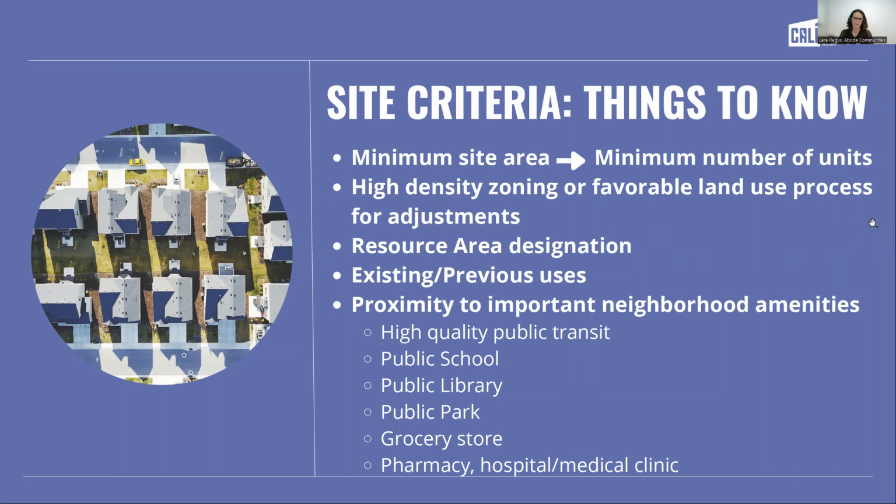Is it a triangle where you are going to have struggles to build at the point of the triangle, because you're typically building a square or rectangular building? So you start to carve out parts of the site that you probably can't use for dropping your building, and also thinking about the extra space you need to account for in a building beyond units. You have all this extra common space, corridors, those kinds of non-residential spaces.